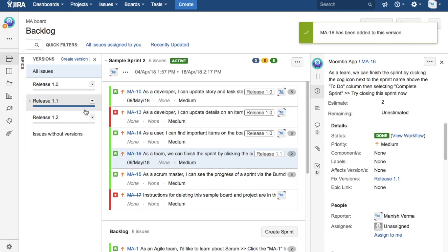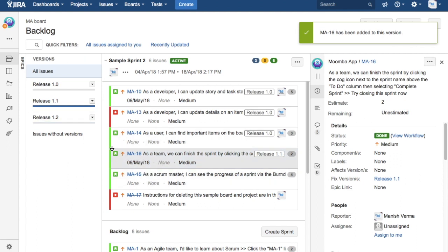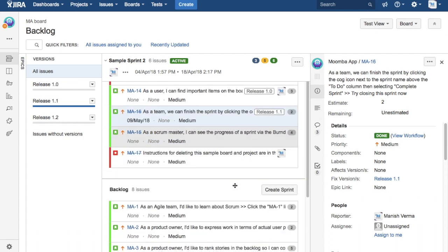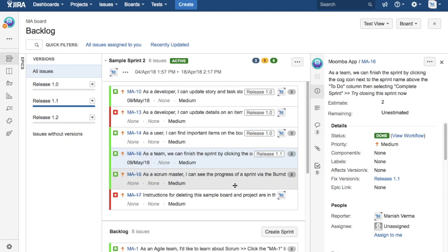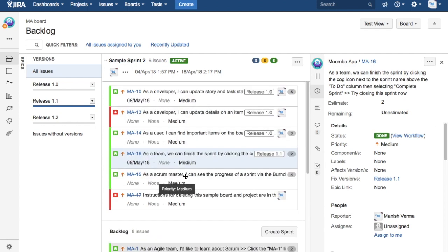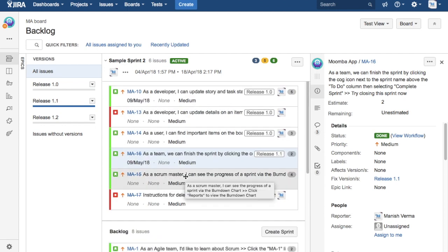I've dragged another issue, another story to release 1.1, and that will be pretty much how you will be assigning the issues to the releases.